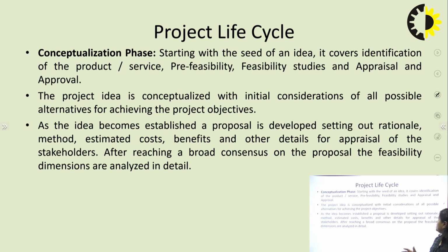Okay, it covers identification of the product or service. So in this conceptualization phase, we cover what product or service we actually want to develop. We need to do the pre-feasibility analysis also. We need to do the feasibility analysis also, to see whether we are actually able to develop that product or not, whether we have the funds or not, whether we have sufficient time, whether we have skilled manpower or not. So we need to do a feasibility analysis in this. So the outcome of this is the feasibility report also.